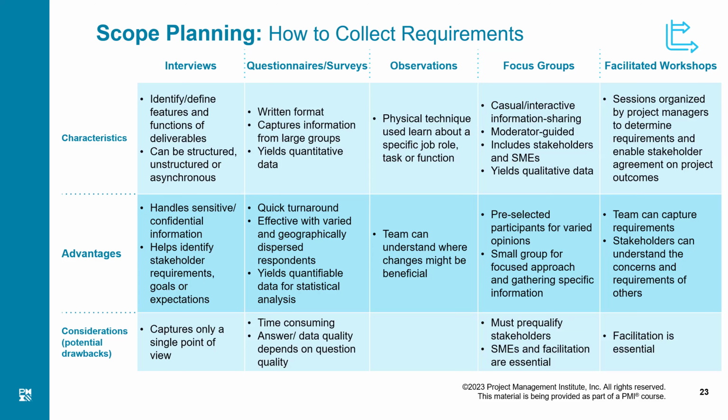If I can get all the anonymous opinions somehow, then I will be able to entertain all the opinions anonymously and again present all the points I have gathered and ask them to vote. That is the Delphi technique.